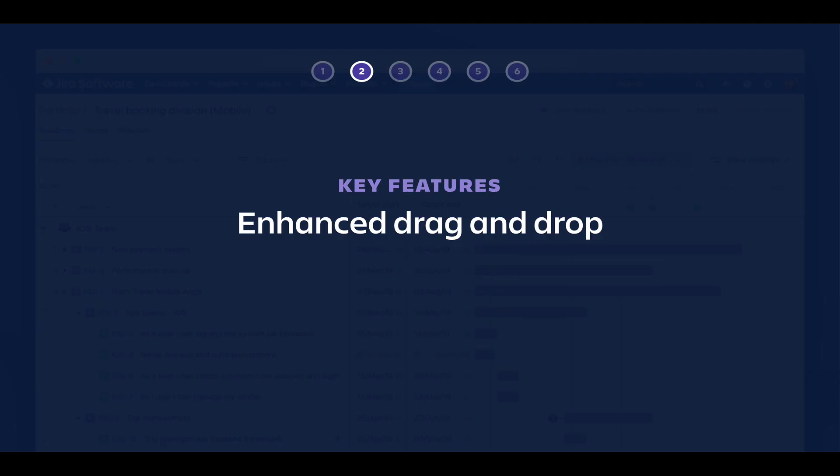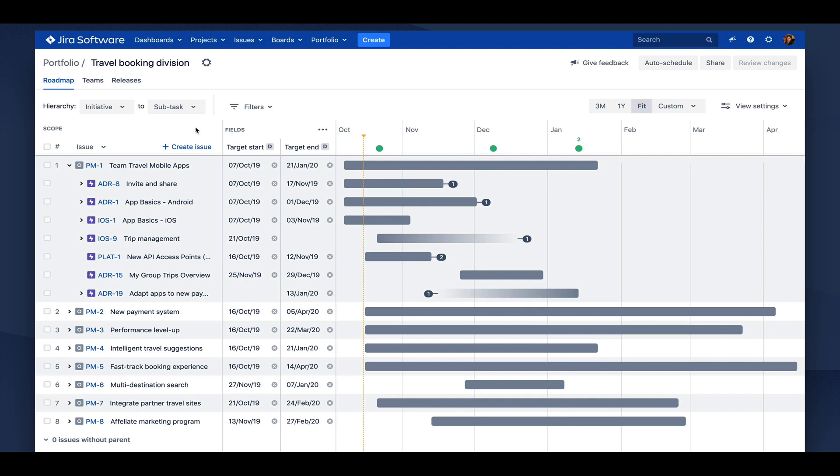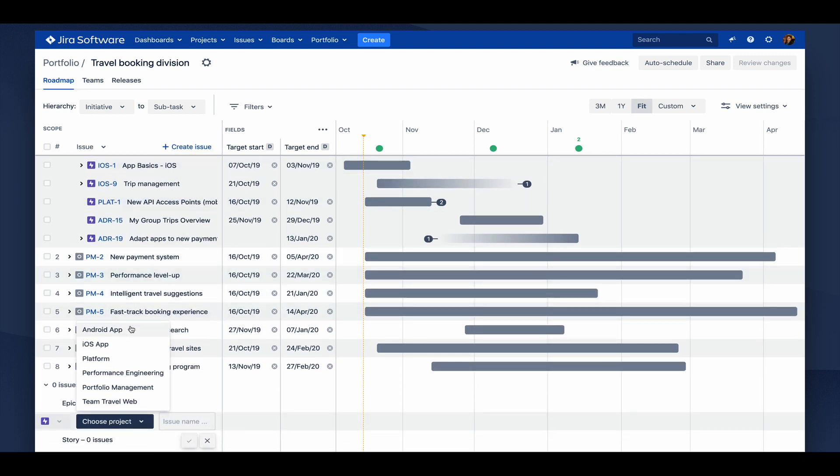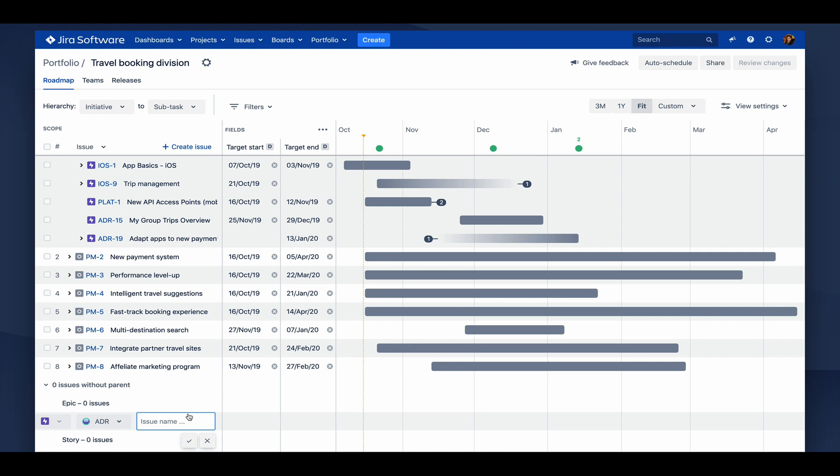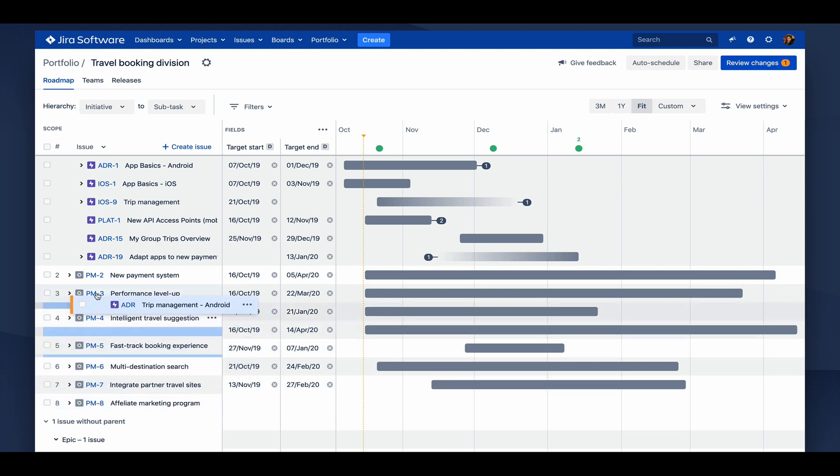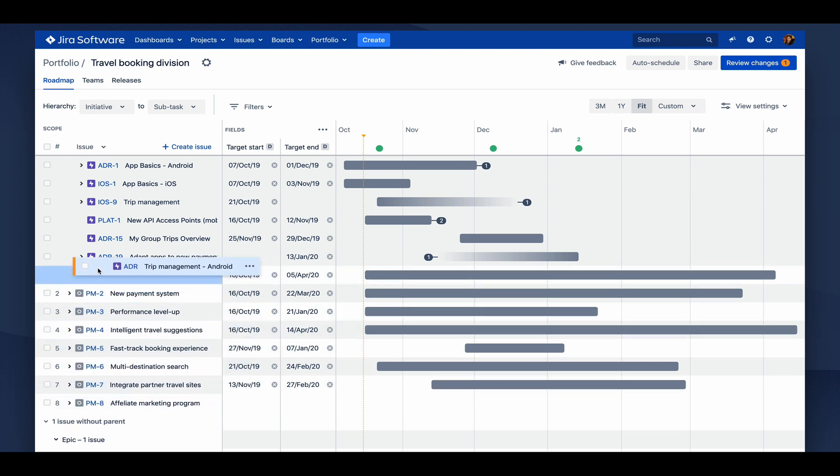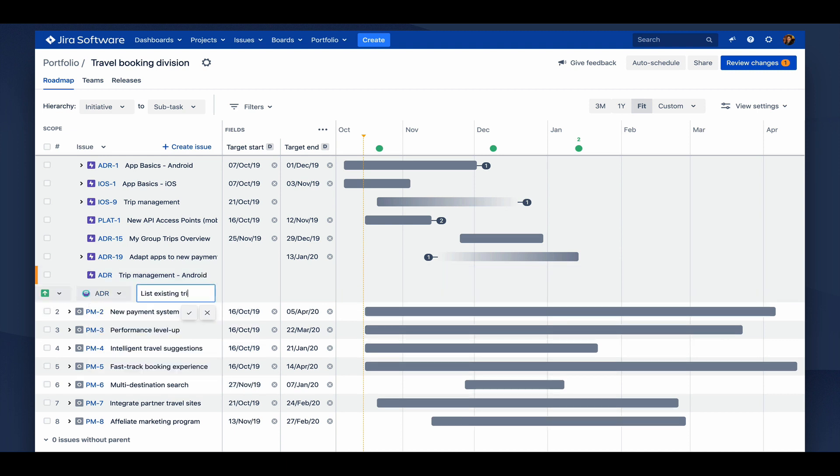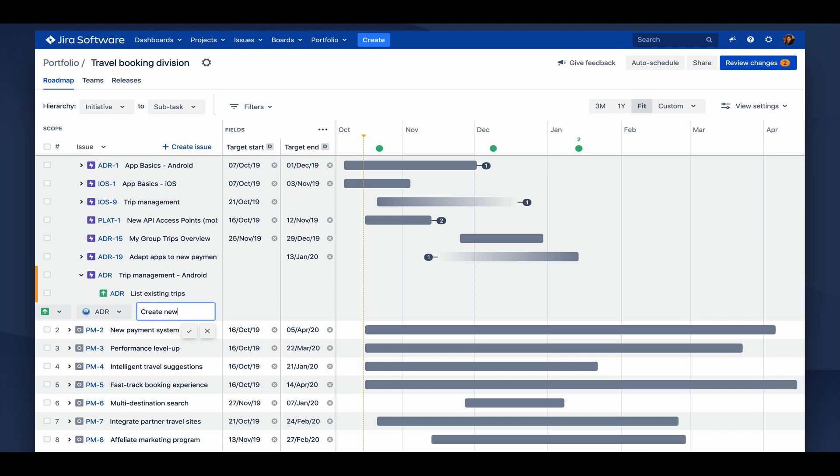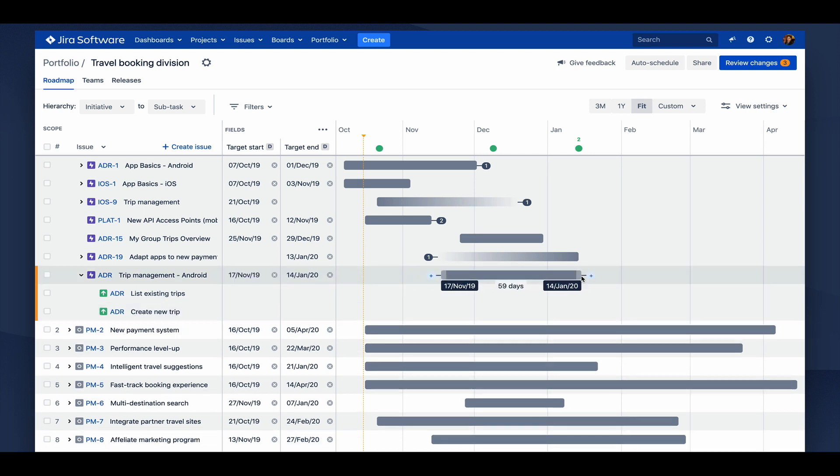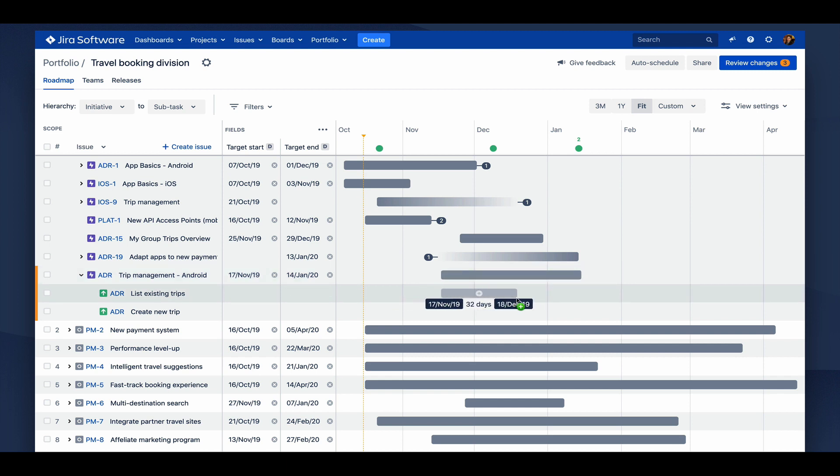Next is Portfolio's enhanced drag and drop scheduling functionality, which gives you flexibility to shape your roadmap to your liking. Some additional context is that this interface is a sandbox, so changes you make won't be saved into Jira until you decide to commit the data to Jira. On the top right, you see the review changes, and it'll increase for all the changes that you make in your plan. So let's create a new epic in the Android app project for trip management. We can quickly drag and drop it into the appropriate initiative. Then from there, it's really simple to create stories for that epic and break it down in line. We can then plan when we'll start work on them by directly manipulating the roadmap. Notice that the epic dates automatically get set from the children.